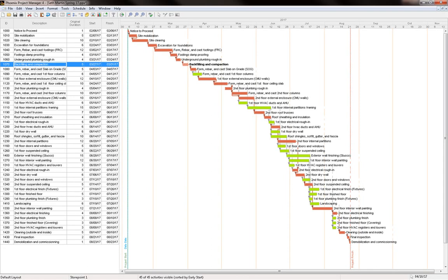Before updating the project, before having negative total float, which may happen if the project is behind schedule, for the time being, a critical activity is one that has 0 total float. So we're going to create a filter telling it, please select the activity if its total float is equal to 0. If it's more than 0, do not select it, which means if it's non-critical, we're not currently interested in it.